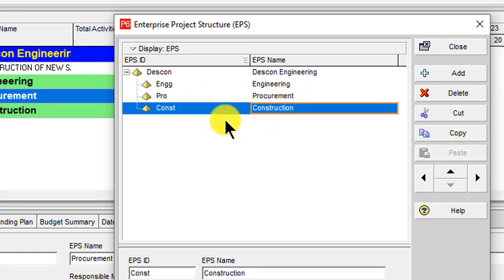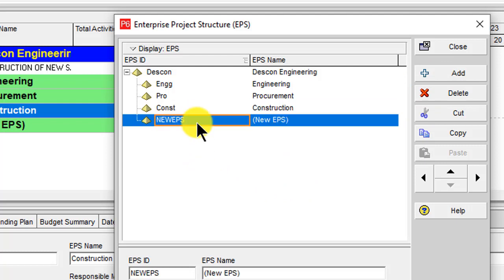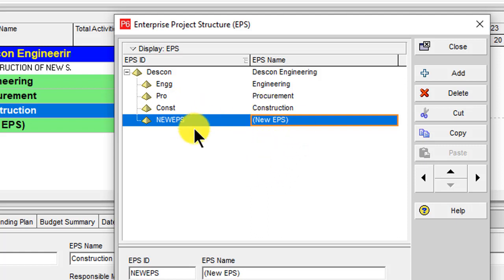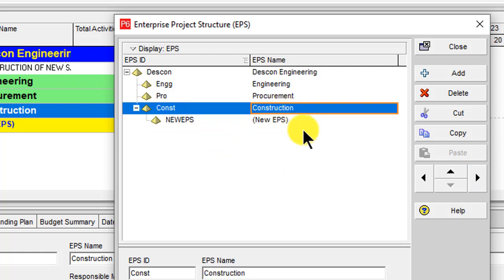This is the way you can add your EPS in Primavera P6. Now let's add further sub-categories. Click Add and you can see it appears parallel to Construction — I want to make it indent under Construction. Select this row and click the right arrow key to shift it right, and you can see it is now indented under Construction.